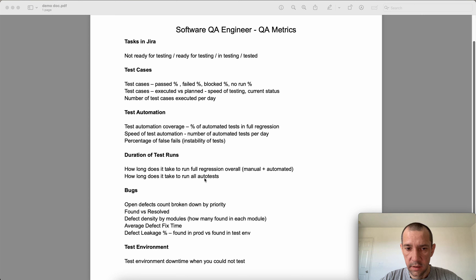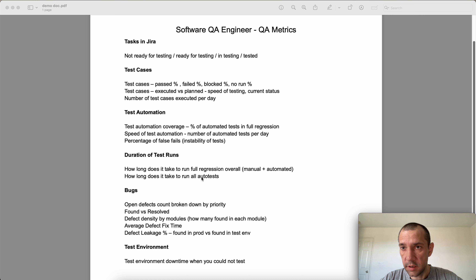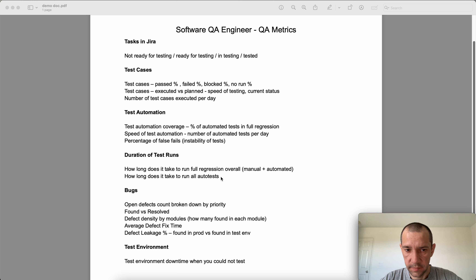On some of my projects, we had a few thousand UI tests and it took basically more than 24 hours to run them. In that case, we planned accordingly and ran those tests only during weekends. So it's useful to understand the duration of your test runs.